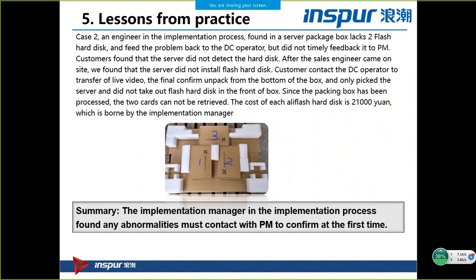And this one is about the parts, and I also mentioned that you need to supervise and watch out for the delivery team when they unpack the package of the server, and make sure every part is removed from the package. Make sure the package is empty except some forms.